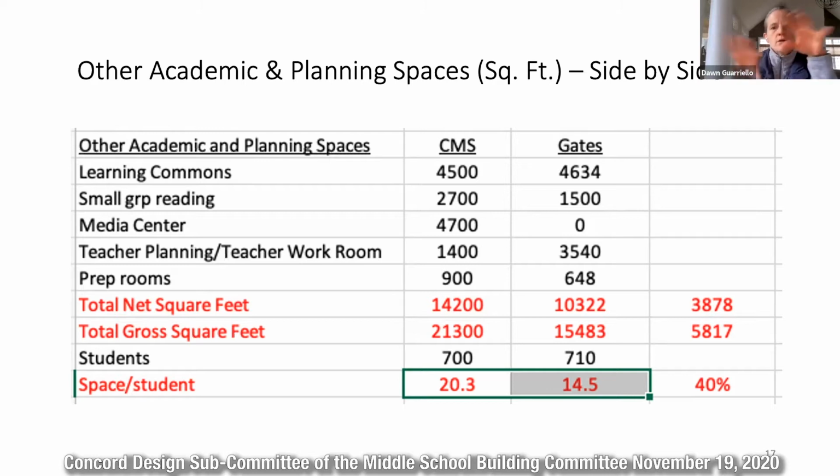But I don't know how much of that is included in the grossing factor, if any. So that's one thing that is worth noting. Once you take it and spread it along the corridors, it starts to get murky with grossing. So I don't know if taking their number and grossing it up is actually true, because they may have shared some of that space with the corridor, which actually would fall into part of the grossing factor at 1.5. Just something to think about.